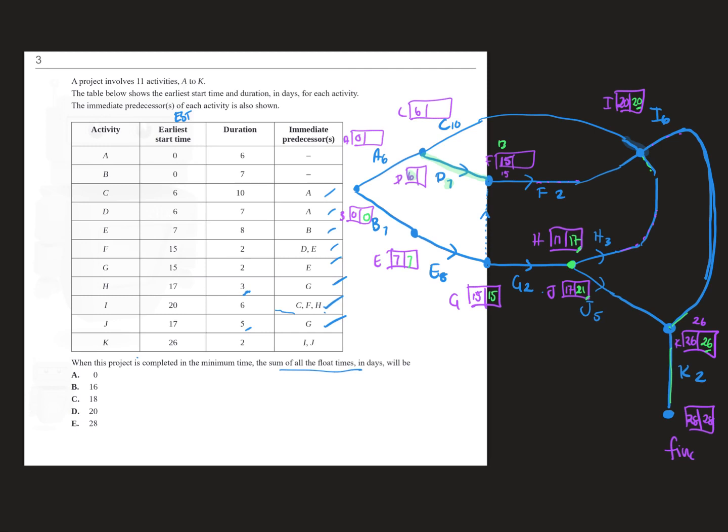But let's keep finishing here. So I'm up here, I'm at 20, and I'm going to minus 2, so that one would be 18. I'm up here again at 20, and I'm going via C. That'd be minus 10, which is 10. And then at C, so if I'm at F, I'm going to go 18 minus 7 would be 11. Or I've got 10 up here.